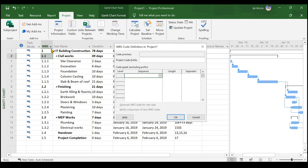You can keep a particular prefix — prefix means the part that comes before everything. Since this is an IT building project, I will use ITC, which stands for IT Building Construction. This will be my project code for the WBS and will appear everywhere. Whatever editing you do will be visible in the code preview on screen.